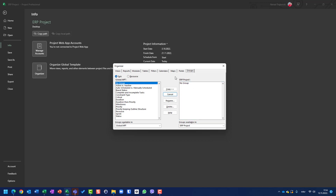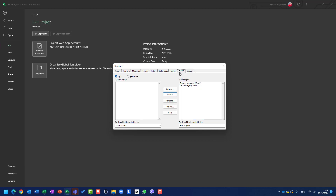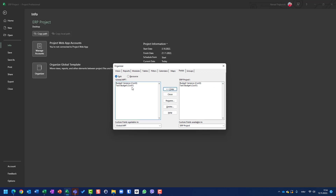I will go here and I will say I need fields — budget variance and task budget. I will copy them from the right side to the left side using Copy. You will see that I have them in my global template.